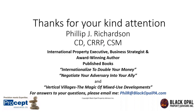Well, thanks for that, Mohammed. I appreciate your question. Yes, definitely, there are issues not just in the Middle East, but in India and China, where I worked as well. But I can tell you that transparency is very important. In other words, sharing with all contributors, including those who provide the equipment, the commodities, and so on, as well as labor to produce the project, a clear and detailed understanding of not only what we were doing, but when we were going to do it, so that they could prepare for that. And it was incumbent on us to make sure that we issued our purchase orders in a timely fashion with long enough lead times, respecting the various specialties that we were dealing with.